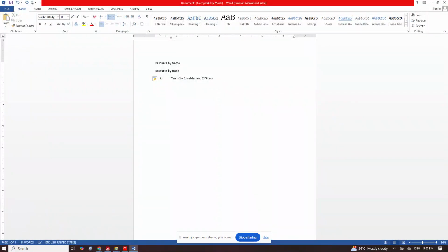And how many man hours? Remember, in the one we did for project manager, I gave it 8 hours. Each of these people can work for 8 hours based on our calendar. Then I will times 8 by 3, which gives me 24 hours. So in that place, I say maximum units per time, I will put 24 instead of 8. It's not telling me that these guys are actually working 24 hours a day. Anywhere I assign team one, they are going to execute 24 hours a day.